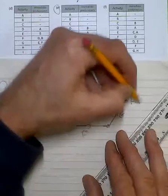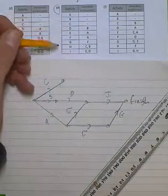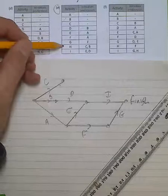So, I'll put my finish here. Now, when we look up the top here, it looks like activity H requires both C and B.